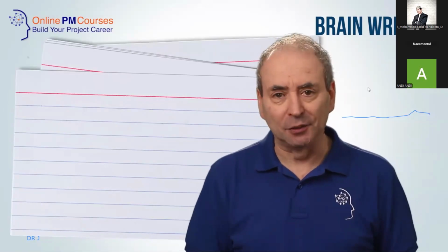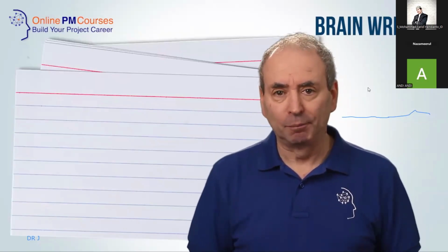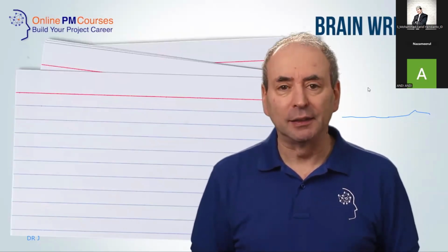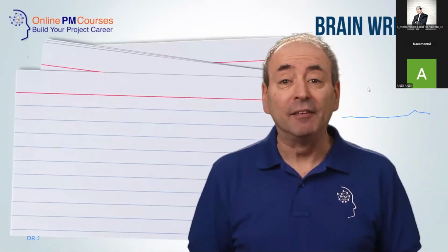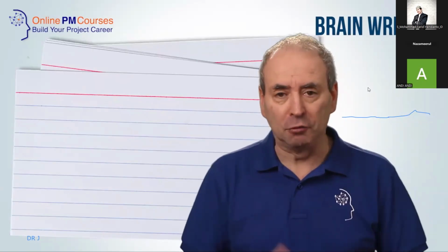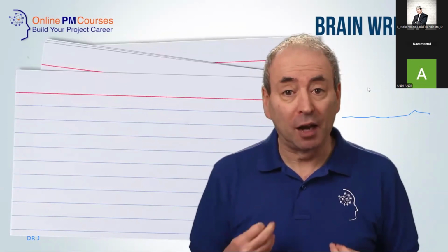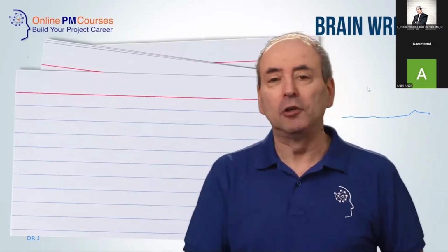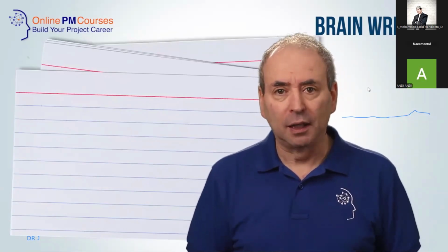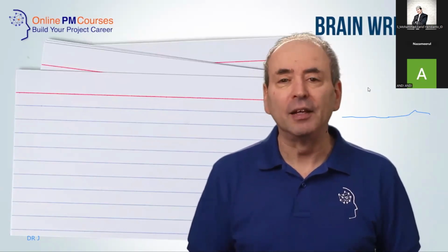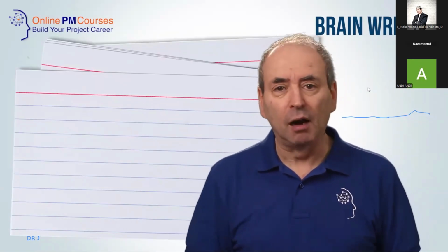The next thing to do is something that is harder to do with brainstorming, which is to develop those ideas. In fact, the first stage of the developing of those ideas is to see if any of those ideas trigger new ideas for new risks. You randomly hand out a number of the cards to each person in the group and ask them in a fixed amount of time to look at the cards and to develop the ideas. If they can think of another risk triggered by that idea, they can write that down on a new card.